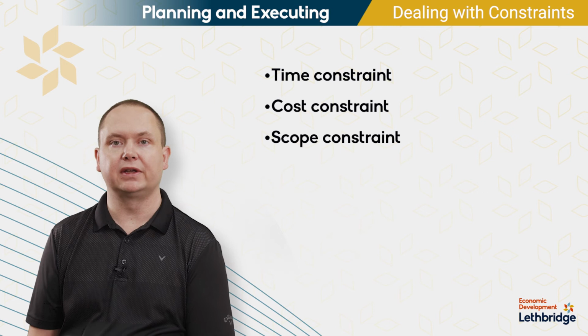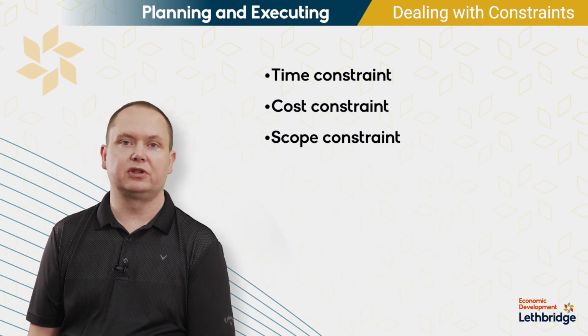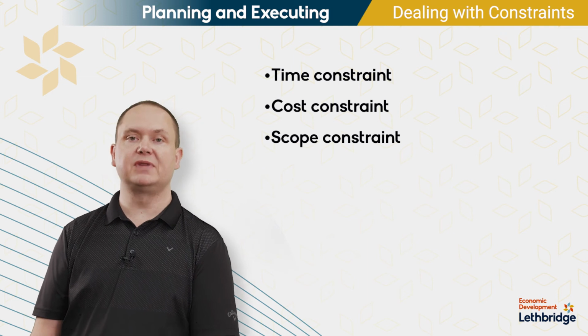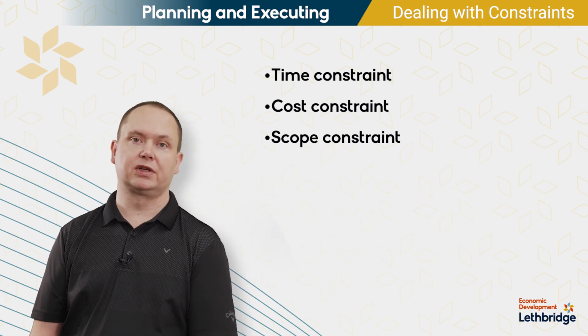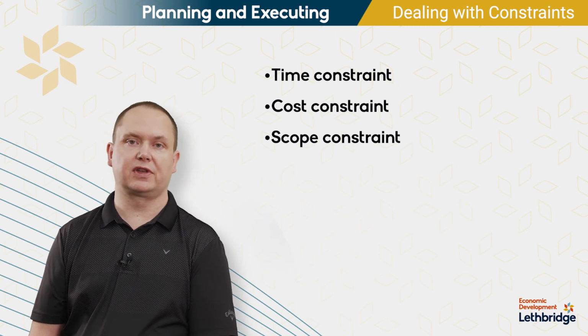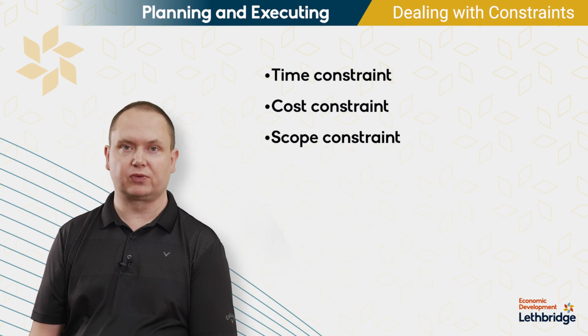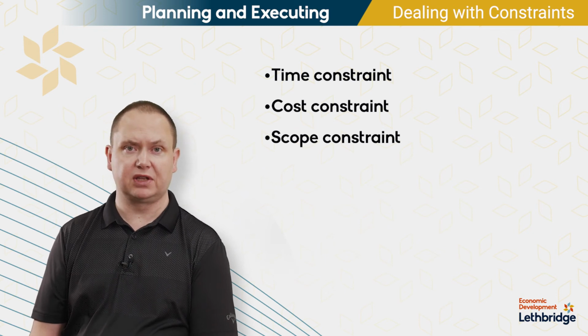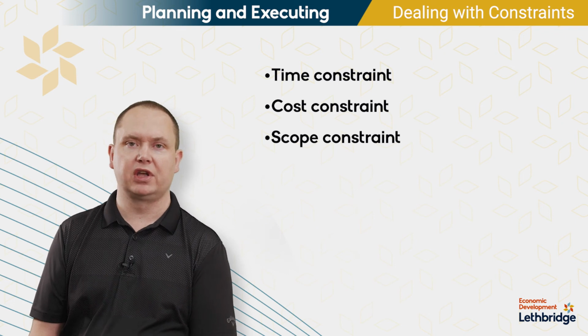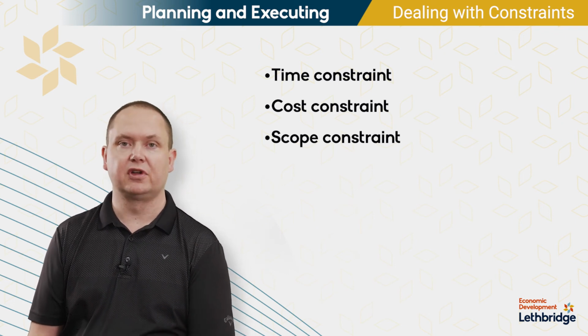With that in mind, you may have an opportunity to crash projects. And this doesn't mean to scrap the project, it means to speed up certain elements of the project. When you went through and you identified your work packages, one of the things that you should also do is note the precedences within those work packages, meaning specifically what has to happen before that work package and what has to happen after that work package.